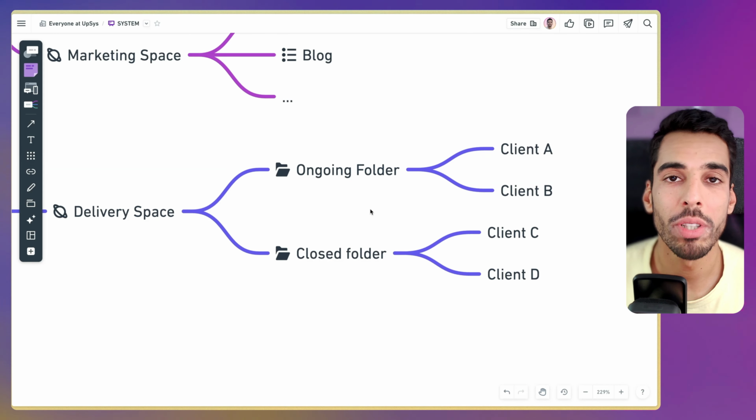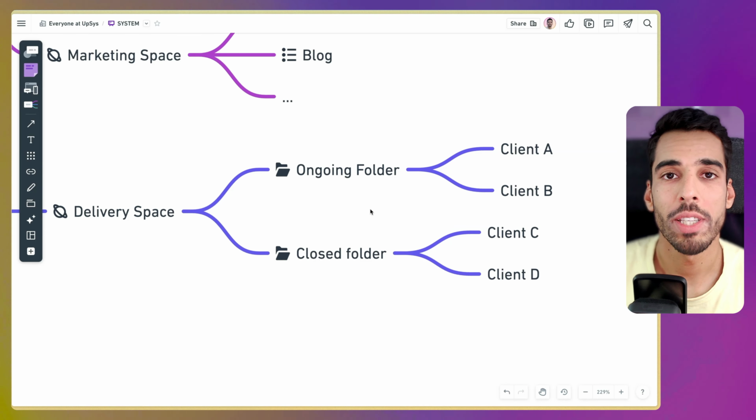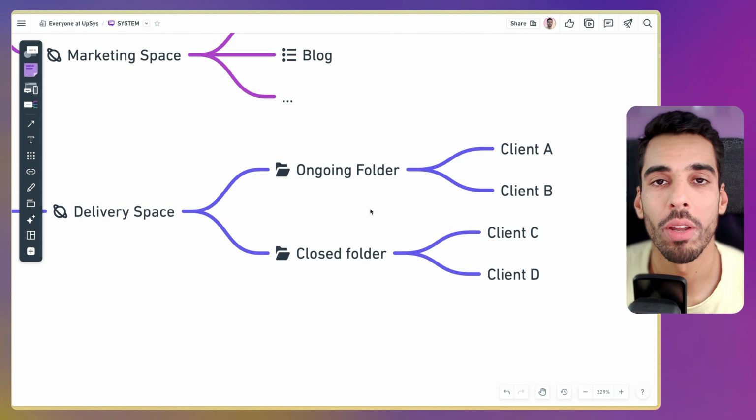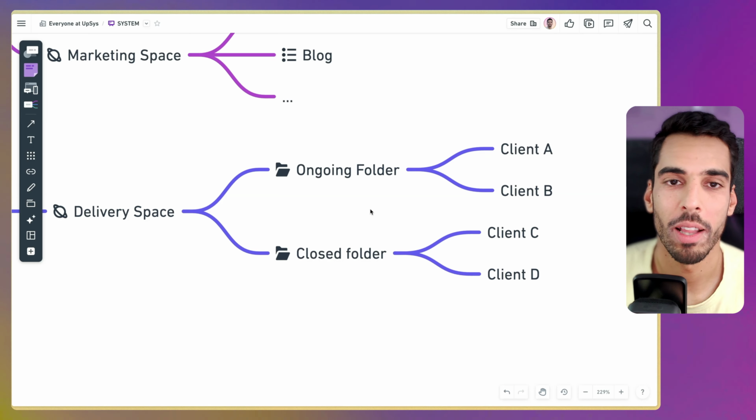It's going to be 30 different lists to create and manage and handle with different automations and templates, so it quickly becomes a mess. Whereas if you have 10 clients and 3 projects each, you could just have 10 lists, 1 client equals 1 list, that's easy to remember, and just 3 main tasks with different subtasks. And I'll show you how you can automate this and make this as streamlined as possible right in ClickUp.